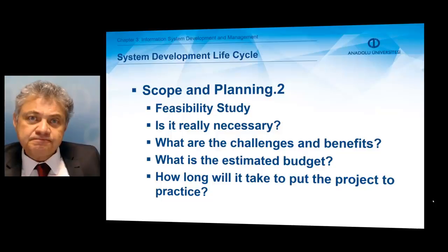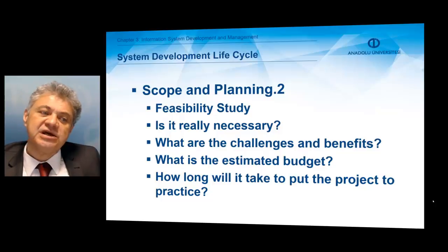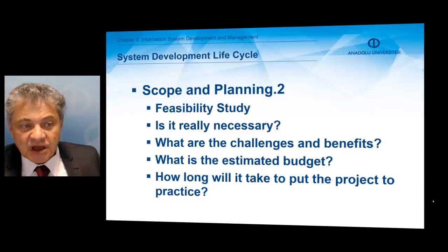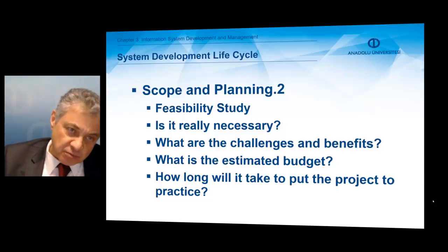Feasibility study is a part of scope and planning, and addresses the doability issues of the project. How doable are the intentions, the aims, the goals, the targets of the project, and the activities, of course. The concerns about the necessity and challenges of the project are clarified in this phase. Also, the estimated budget and the expected completion time of the project are planned.